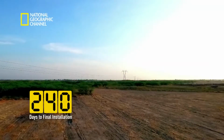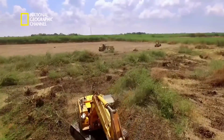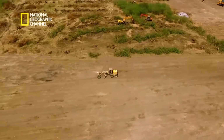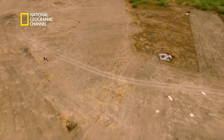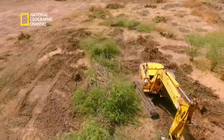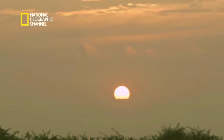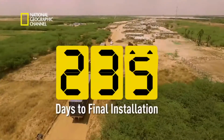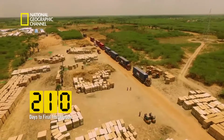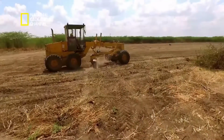It's August 2015, and the team at Adani is scrambling to get the open storage area ready for the hundreds of containers that would soon be unloaded at site. When we landed at site and saw the magnitude of the work we needed to do, we thought we had bitten off more than we could chew. By September 2015, the shipment from China had started arriving, and the site was nowhere near ready.